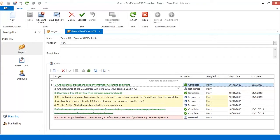New in 13.2, end users can alter the business model at runtime without recompiling the XPO-based XAF application. Let's look at the project object from the simple project manager demo. It exposes a list of associated tasks that have statuses. We can calculate the percent completed of the current project by dividing the number of completed tasks by the total tasks count and display the result in the UI.